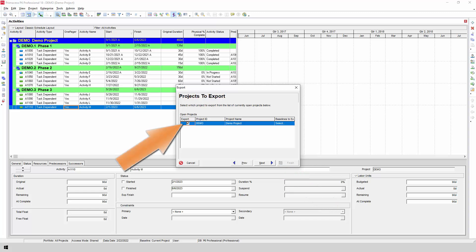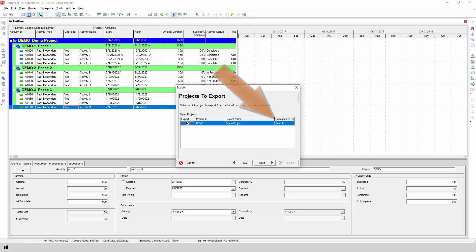Select the project or projects that you would like to export. In this example, we're only going to build a single project chart, but if you have multiple projects open in Primavera, you'll have the option to export multiple projects into a single XML or XER file, which can be imported into OnePager. If you plan to display baselines in OnePager, be sure to select a baseline for export as well.